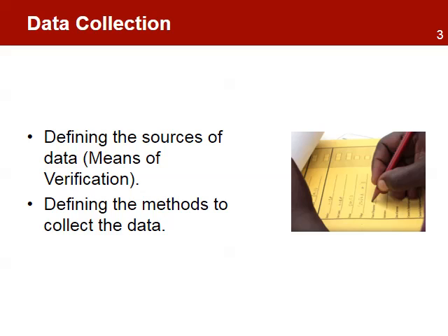An important rule in results-based monitoring is that the project should collect only the data that is intended to be used. The performance information is a management tool, and there is no need to collect information that the project and key stakeholders are not going to use.